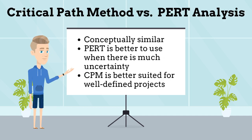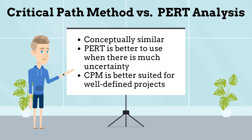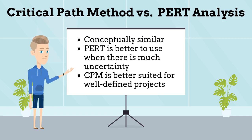What are the differences between the critical path method and PERT analysis? Although the critical path method and PERT are conceptually similar, some significant differences exist, mostly due to the type of projects best suited for each technique. PERT is better to use when there is much uncertainty and when control over time outweighs control over costs. PERT handles uncertainty of the time required to complete an activity by developing three estimates and then computing an expected time using the beta distribution.